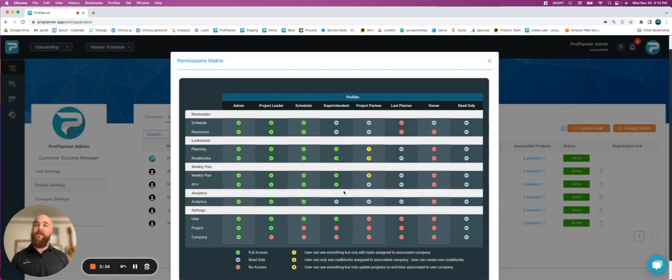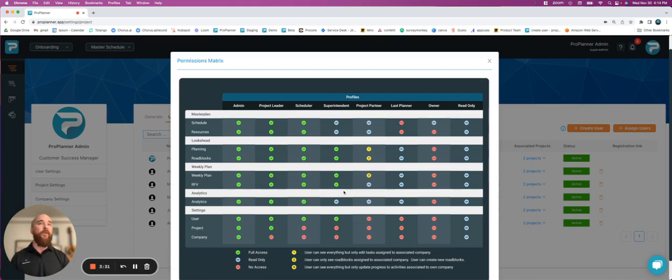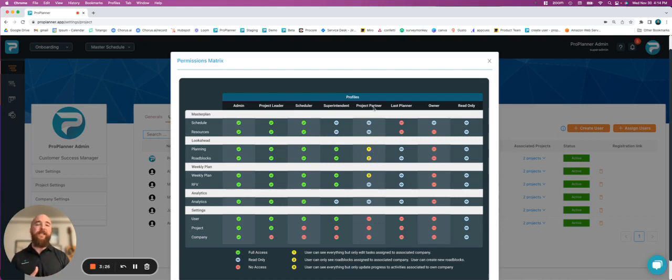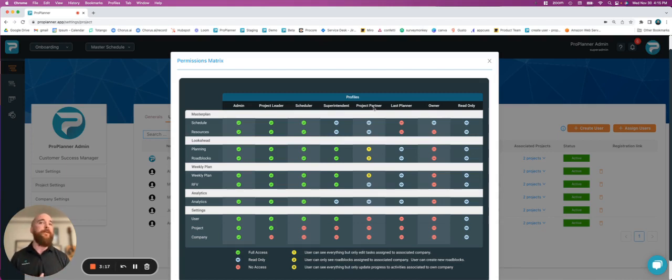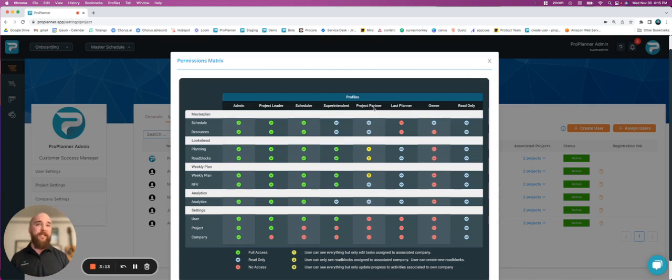As we move down the line, we restrict more and more settings, but the really nice one that we have is for project partners. This is intended so that you can invite a subcontractor to participate in your project and on your schedule, but all they can do is create new tasks for themselves in the look ahead, and they can't make any changes to other companies' tasks as well as roadblocks.